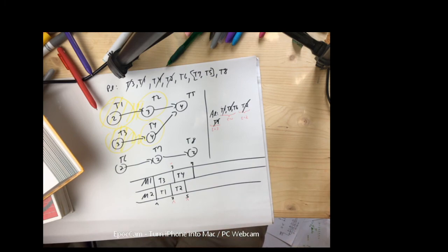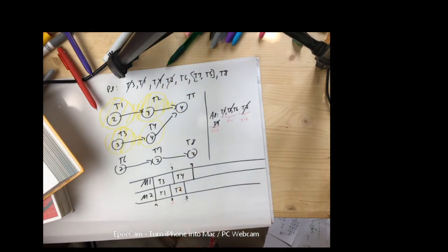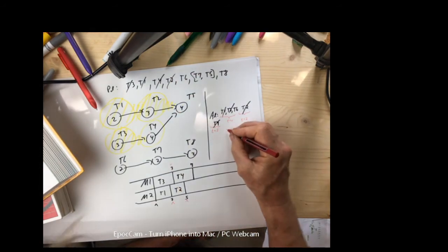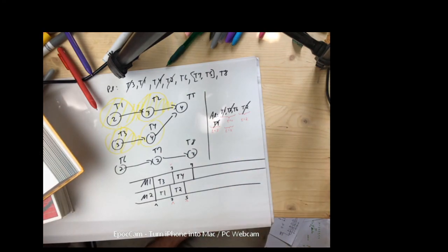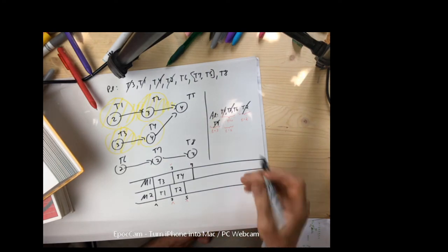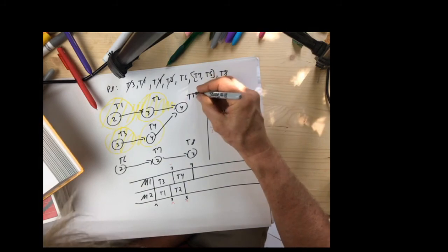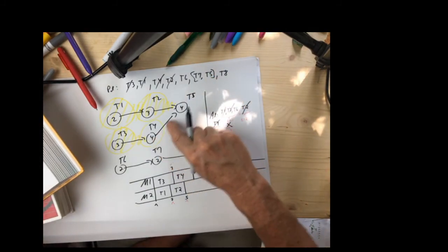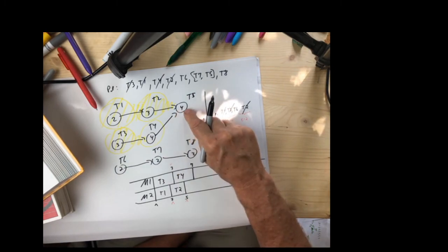Now at time equals 5, what just happened? Well, machine 2 just finished task 2. So time equals 5. Did anything happen? And the answer is no. Because T5 has not become available. T4 is still running. It's circled, not crossed out. There's still an arrow going to T5.